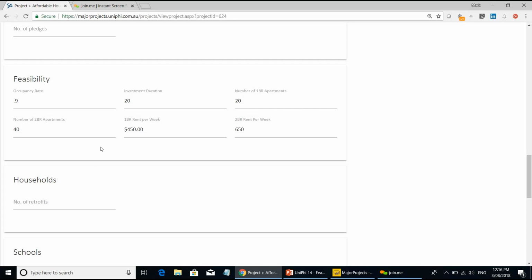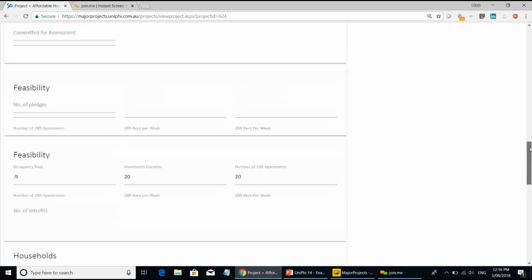So you could expand this to include a one-level variable for the construction cost, and then percentages that you're going to use to derive the other costs on that. So, for example, a $5 million building with 10% consulting costs and 5% FF&E and 10% contingency. All of those custom fields could be keyed in here, and then they'll automatically calculate and flow through to the revenue and cost module, which is what we're going to look at now.